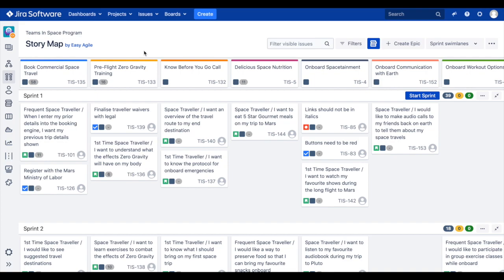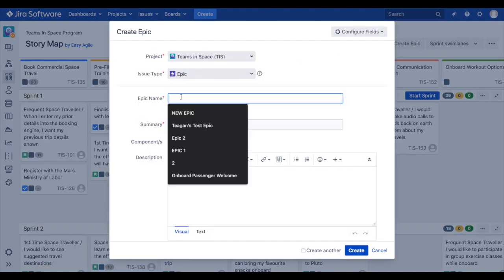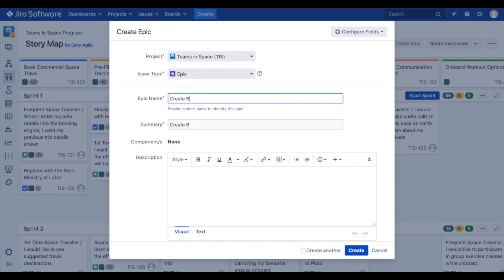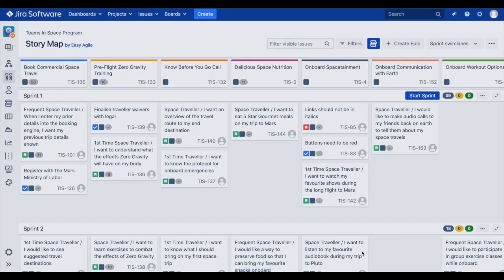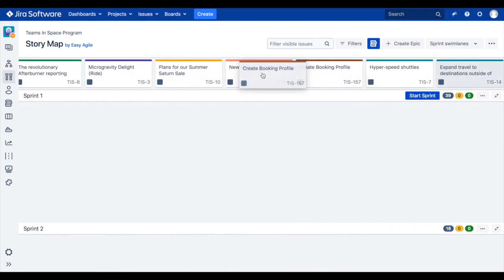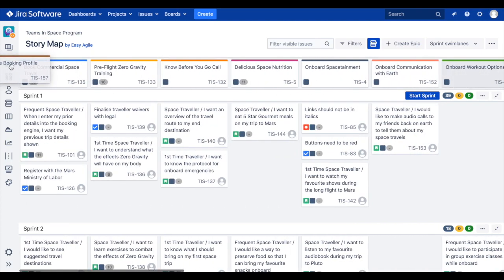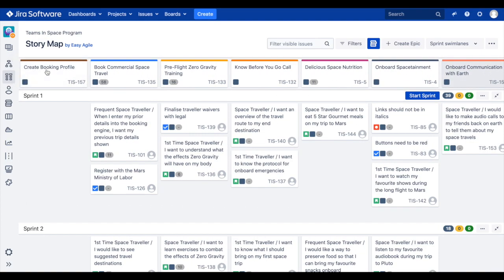We can also create new epics to add to our backbone by clicking on the create epic button in the top right-hand corner of the story map. New epics will appear at the end of your backbone. They can be dragged and dropped into its desired position, and the epic will also appear on your Agile board's backlog.